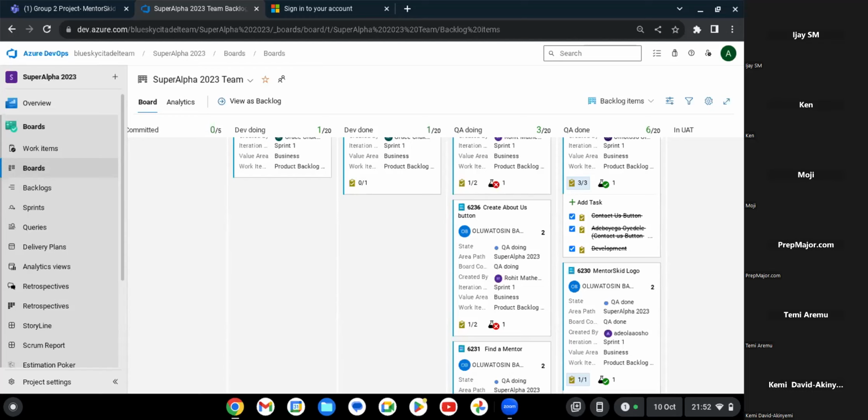That's why sometimes, thanks to Jira, you have incomplete stories being taken on and completed. No, it depends on the Scrum Master, unless the Scrum Master doesn't know what you're doing. You can close all your stories and then carry it over to the next sprint. So anything that is not completed, once you close the sprint on Jira, it takes it to the next sprint. And on that ticket, you can scroll down and see that it has been existing from the previous sprint. So it will tell you the number of sprints that ticket has existed through.